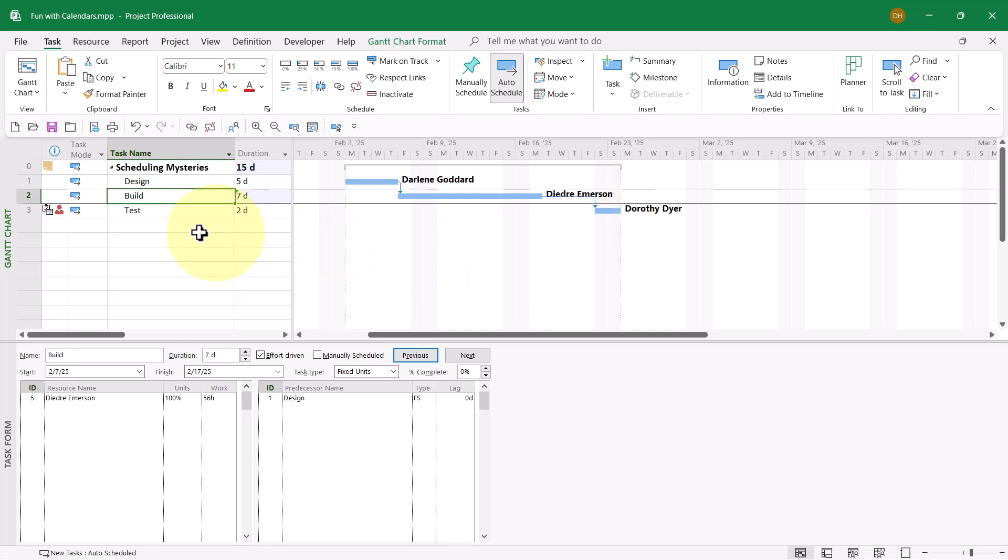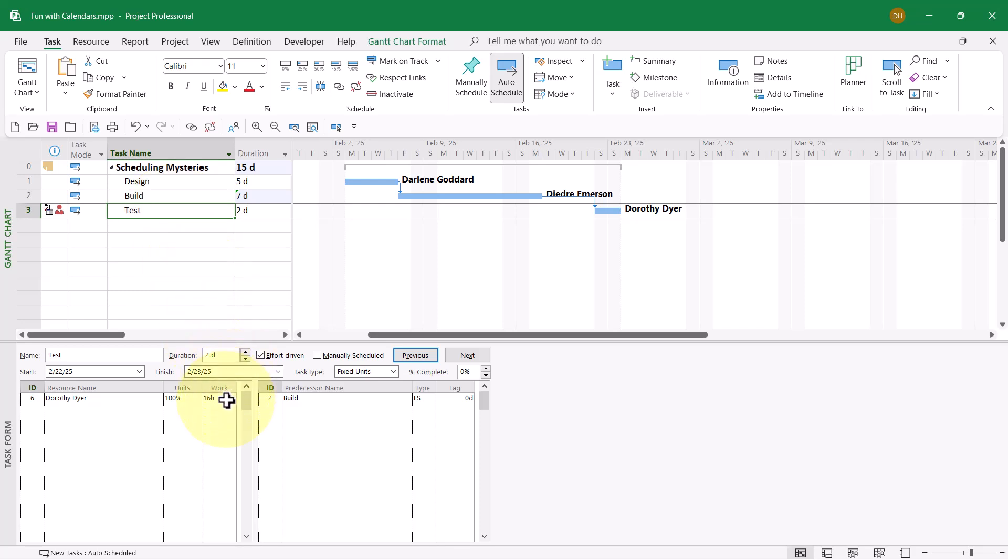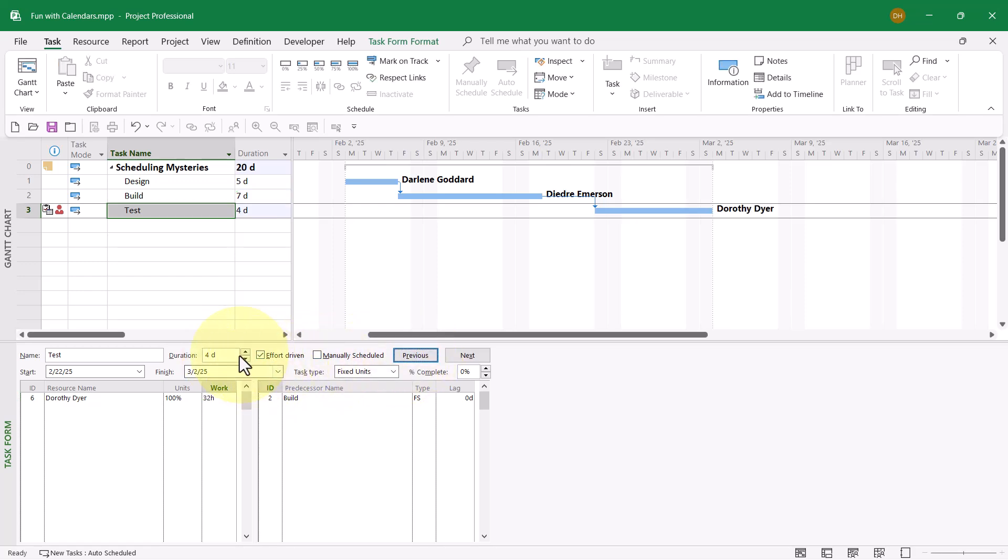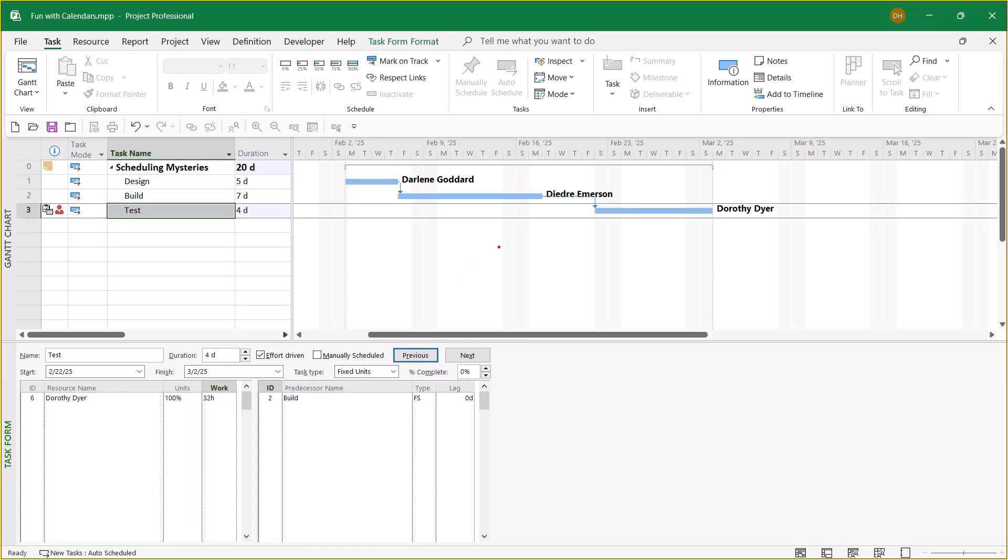Build finishes now on Monday of the week of February 16th. Therefore, the weekend task moved to the weekend of February 23rd. Now let's go a little bit deeper. What if we were to change the duration of Dorothy Dyer's assignment, changing her work from 16 hours to 32 hours? Microsoft Project will give us a duration of four days, and yep, by golly, there it did.